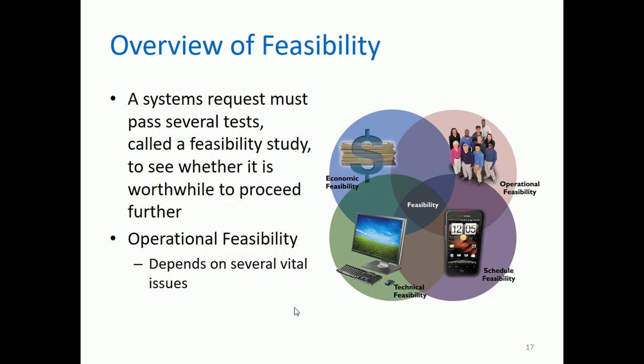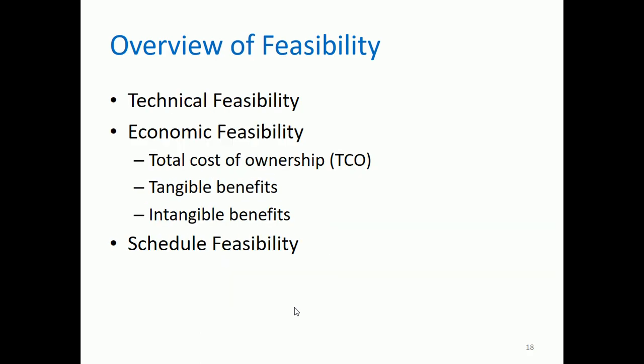It depends on several vital issues, but with regards to operational feasibility, for example, if your proposed system will improve the services, the users will be satisfied, the customers, the clients will be satisfied, then it is feasible in operational feasibility. Okay, next is we have technical feasibility. Technical feasibility means, do you have the infrastructure, the IT infrastructure and resources to push through with that project? If not, then it is not feasible. If yes, of course, the project can start.